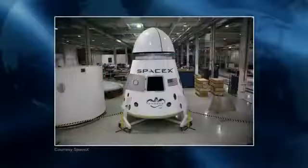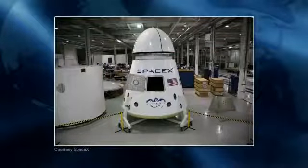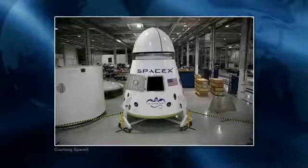I'm assuming you were pretty involved, as you were talking about. What was your experience? As part of the Space Act agreement, we've been looking at milestones since the very beginning of the development program. We started out with an initial kickoff meeting and then went into what we call a preliminary design review. We had a number of NASA engineers looking at the preliminary concepts of the design, just at the high level. And then we proceeded into critical design reviews as well as detailed reviews of various testing events